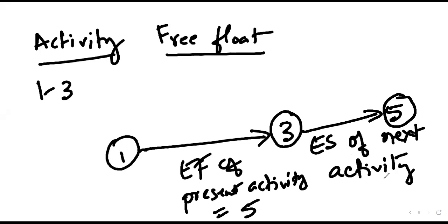What is the early start of the next activity? 12. So what should be the free float? Answer is 7. Correct. So the first free float answer will be 7.